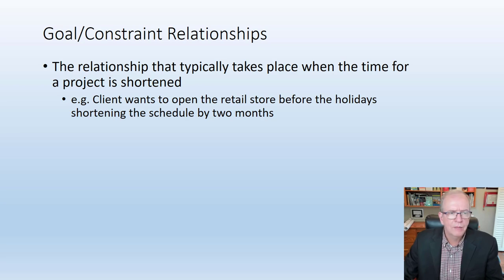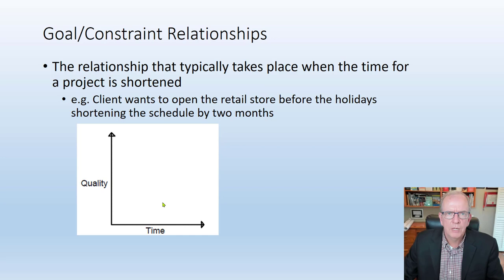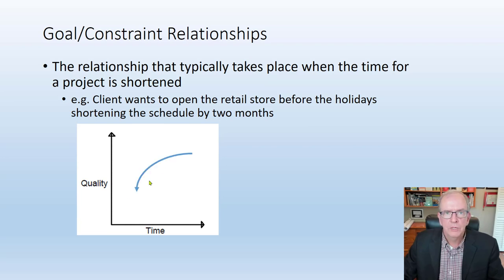To get a sense of how these constraints interrelate — time and quality: if you fall behind on time you rush things. I remember when I was acting director at George Brown college, looking after technologies and project management for a new building. We had a building that was supposed to be built by that coming academic year in September and it was about three months behind schedule with six months to go. The problem is we didn't have a plan B for where we were going to put those extra students. It was rushed somewhat, and it's a good building to walk around and look at quality issues. This was when Ontario got rid of grade 13 and we had an extra cohort of a couple thousand students coming that year. If things get rushed, quality goes down, and that becomes either a lot of rework or it never really gets as good as it could have been.